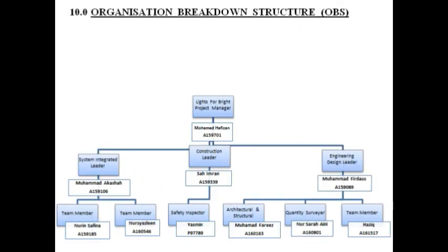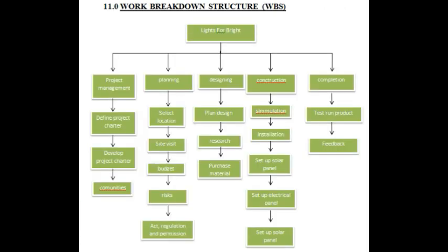In OBS, we have our project manager. Under that, we have the system integrated leader, the construction leader and the engineering design leader. And in WBS, which is work breakdown structure, for Light for Bright, under that we have project management, planning, designing, construction and completion.